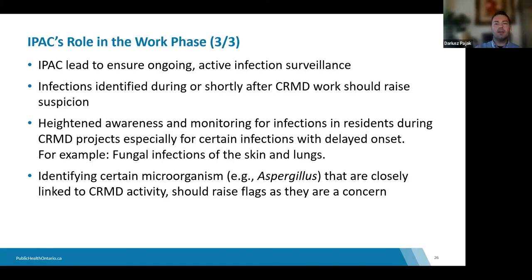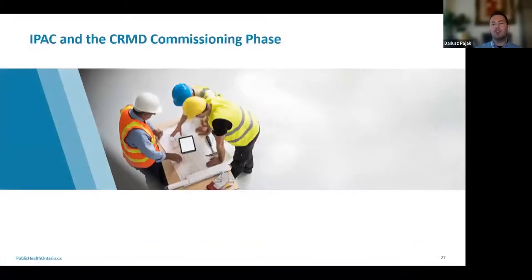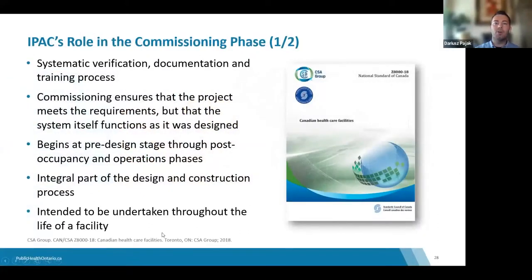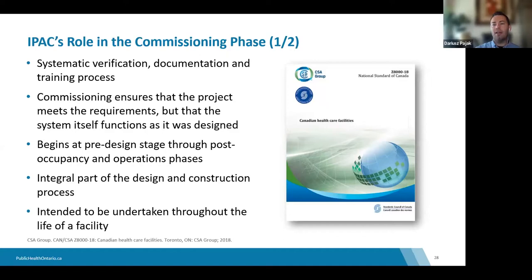Our next phase is commissioning. Commissioning is a process used to ensure that all the work has resulted in a functional space. This requires that everything is completed, assessed, and that all the various building and mechanical components of the project are validated before the space is occupied. As the IPAC lead, you want to verify that all IPAC operational components are in place and that any corrective actions are taken before anyone occupies the space.